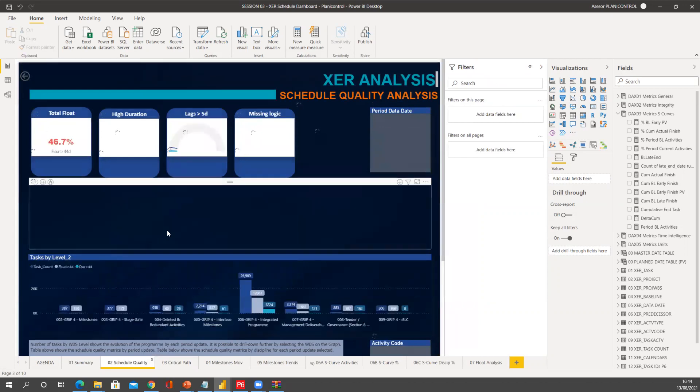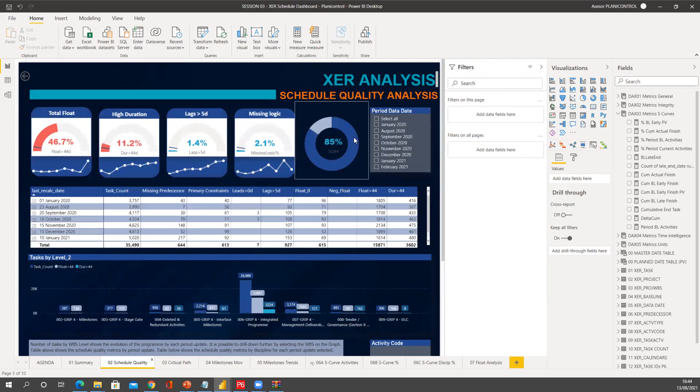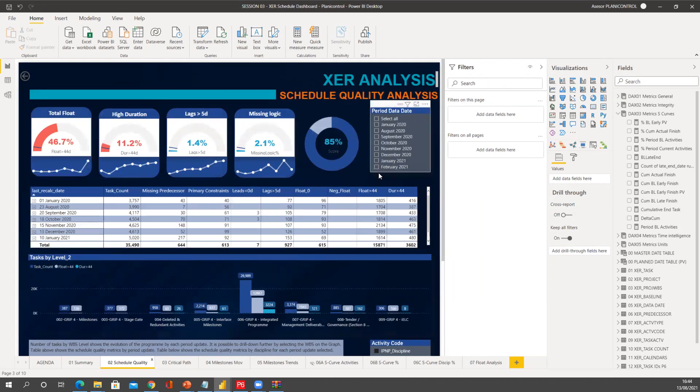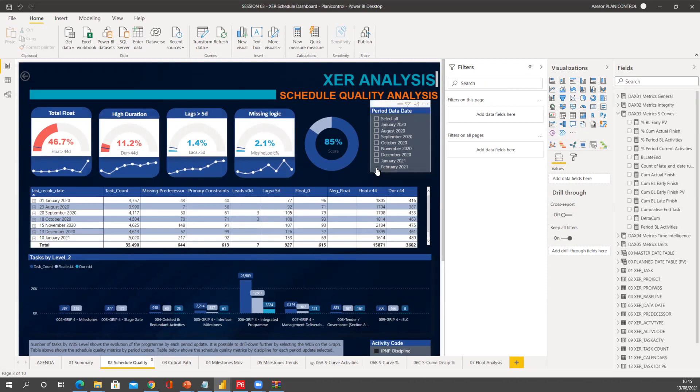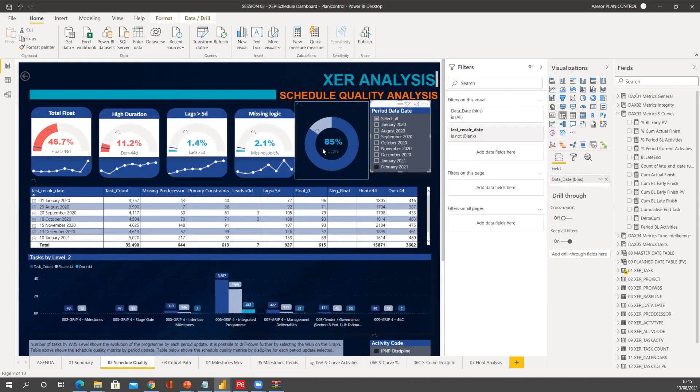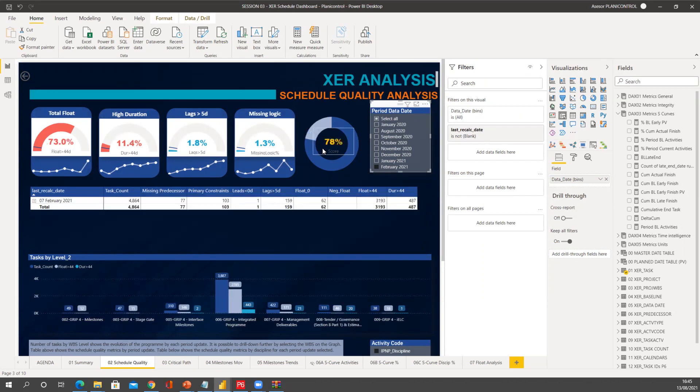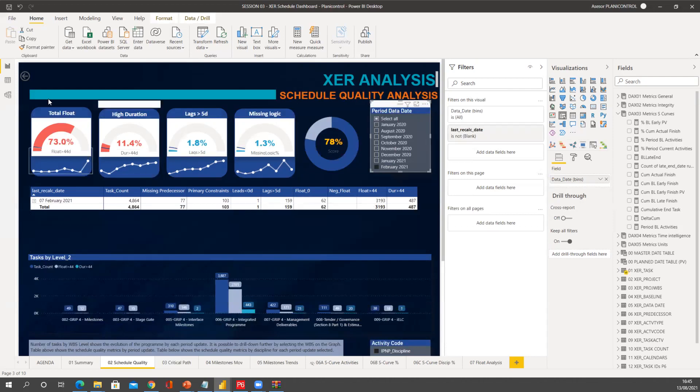In here, as I haven't selected any update, it's giving me the average, the overall schedule quality for all my XCR files that are in that folder at the moment. But if I want to check that February update, then I will see here 78 percent, and I can check what I'm missing. So I have really high total float values. Duration is over the DCM recommended value, and lags and missing logic are just fine.